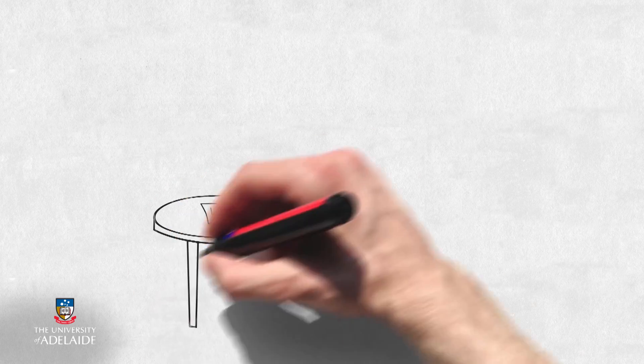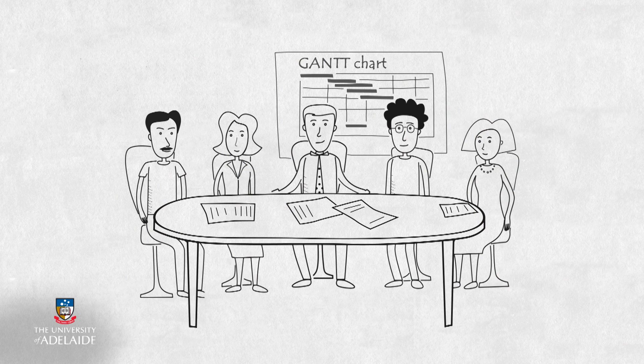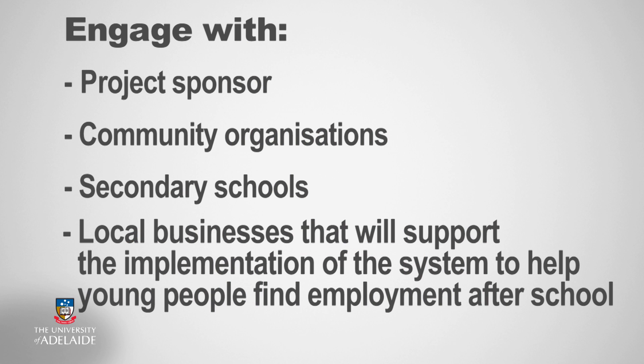Let's contextualise this to Peter's office project and consider the stakeholders that he needs to engage and communicate with throughout the project lifecycle. Peter has a diverse group of stakeholders that he needs to consider. The management team within the organisation, as well as his project team, make up the internal stakeholders that he needs to manage. External to the organisation, Peter will need to engage with the project sponsor, community organisations, secondary schools and local businesses that will support the implementation of the system to help young people find employment after school.